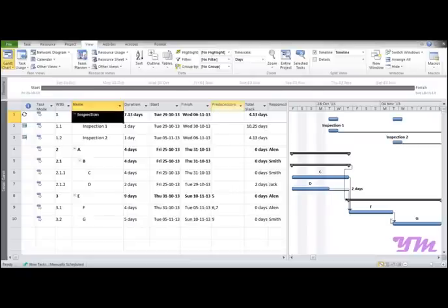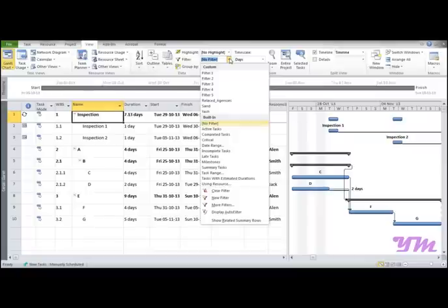Now let's look at the second part, that is filter function. Now in case of filter, the view is generally based on the selected criteria. So now let's get started using a filter function. To do so, we can go on to this view tab, and under that we have an option filter over here. So similarly as group, it has some built-in filters itself. So suppose if you want to look at the critical activities, you can just click over here on critical.